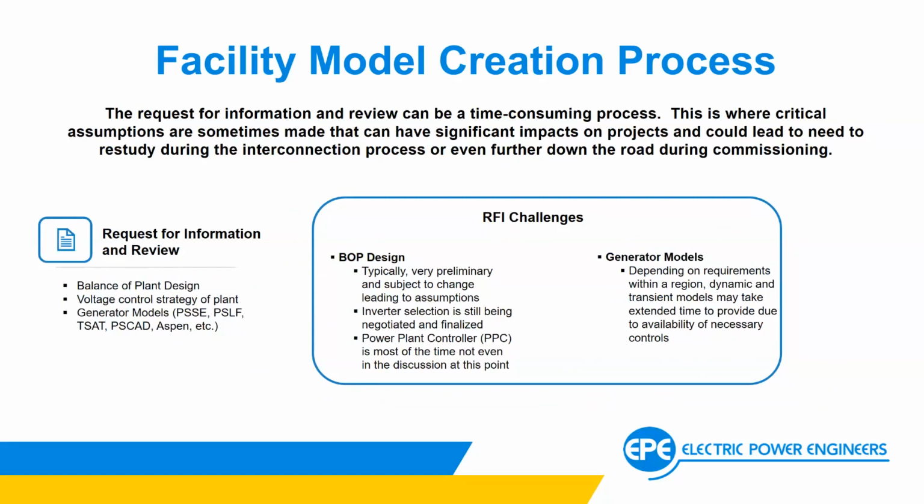So, starting at the request for information review, keep in mind that this project is multi-person, multi-team, multi-group oriented. It's basically reaching out to a lot of different individuals, whether they be the owner, the developer, the OEMs, the engineer of record, or other consultants in some cases, to gather all of the data in order to build the models. Again, like I said before, we've got the balance of plant data, which includes your main power transformer, your collection system data, your pad mount transformers or up tower transformers, and your inverter based resources, wind turbines, inverters, etc.